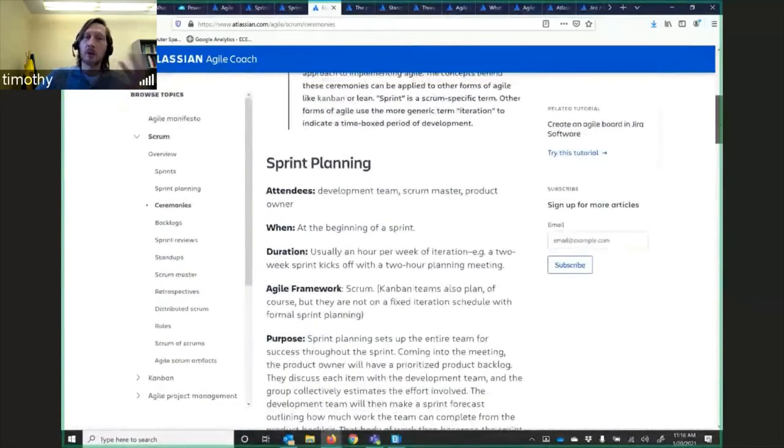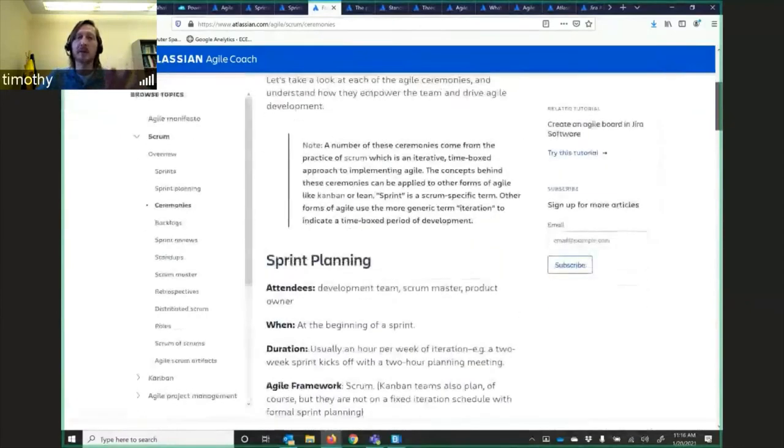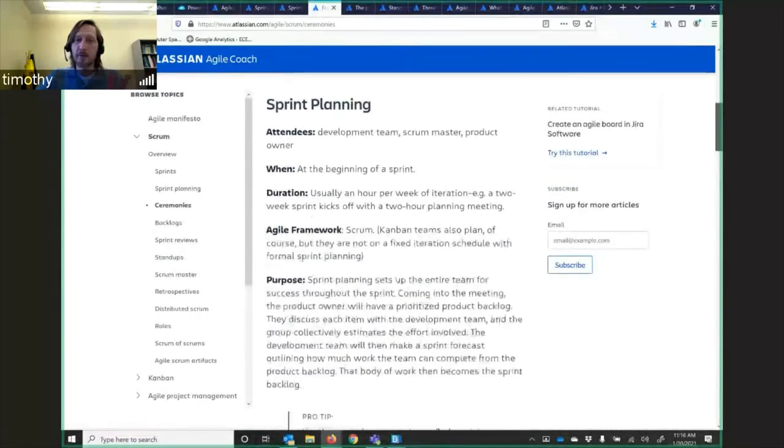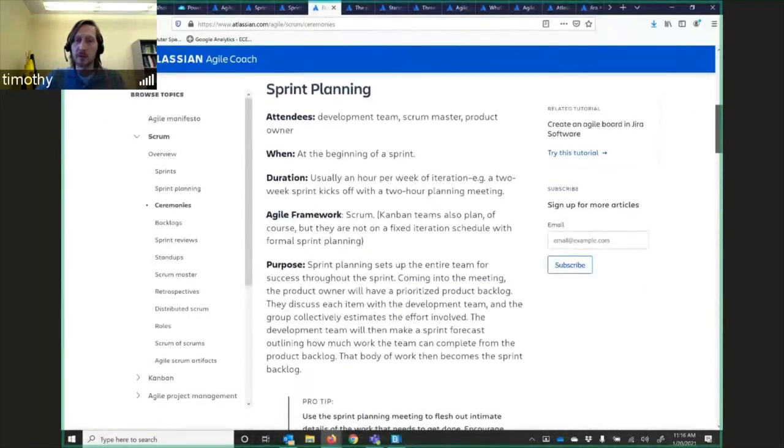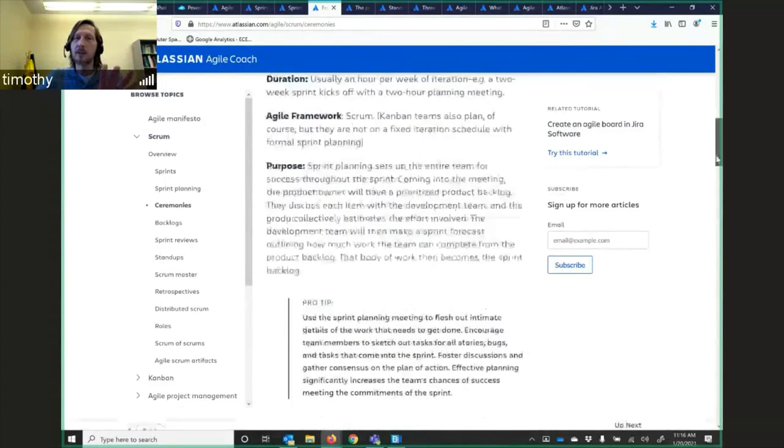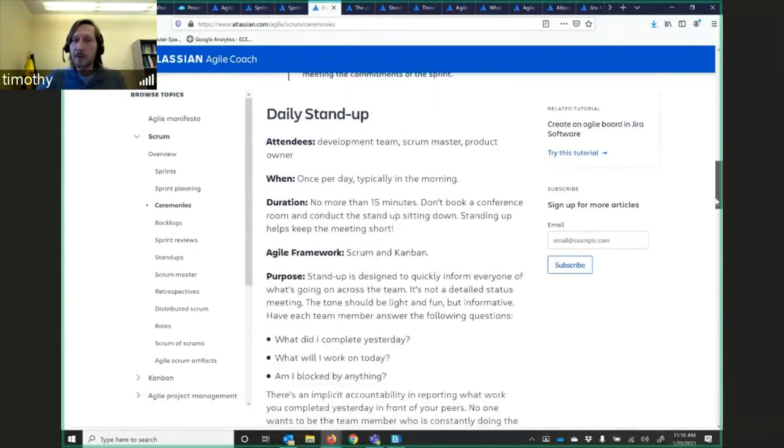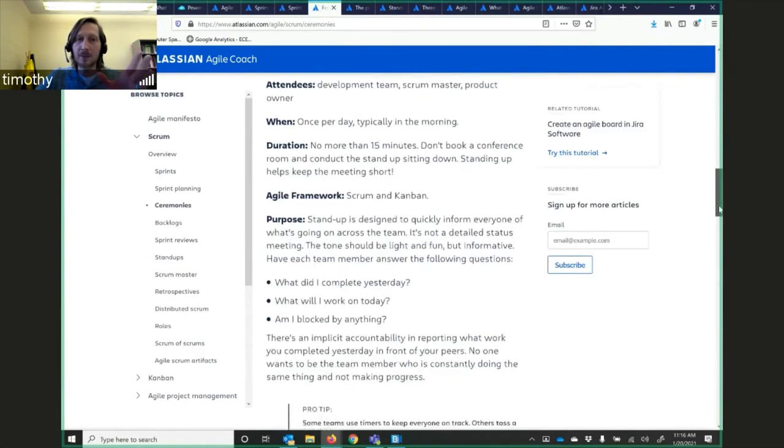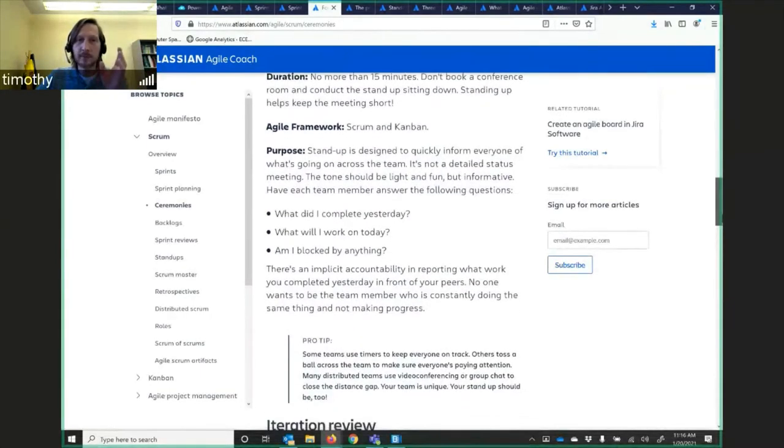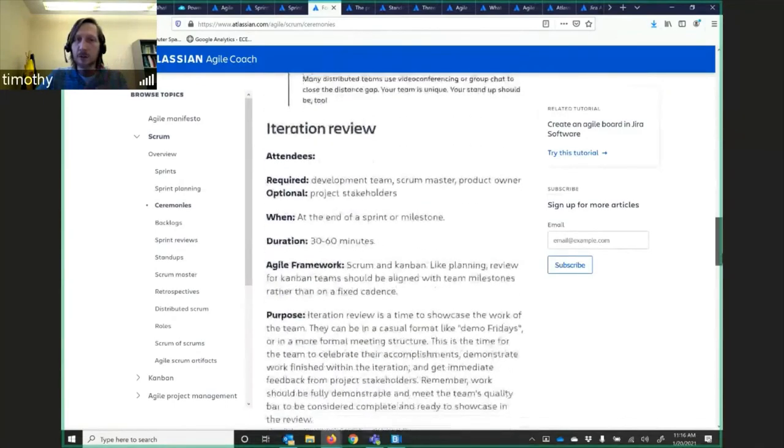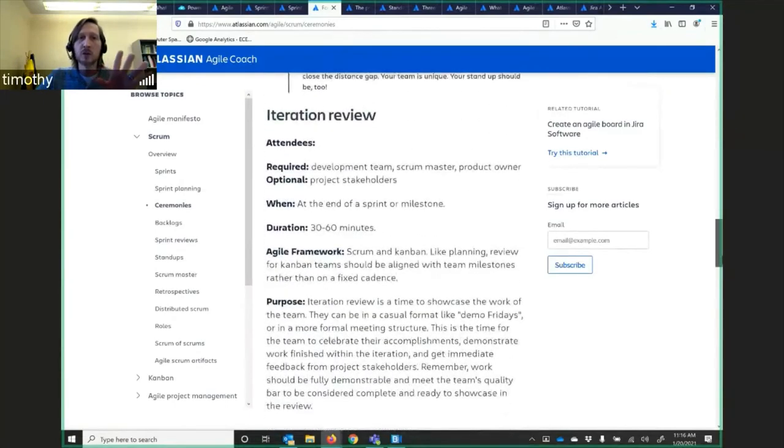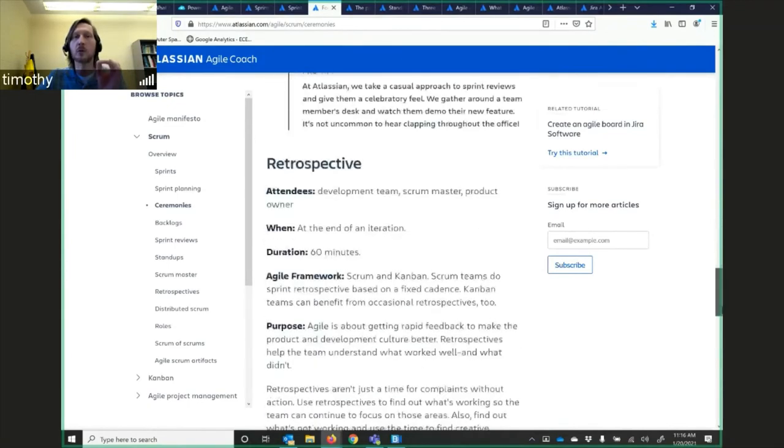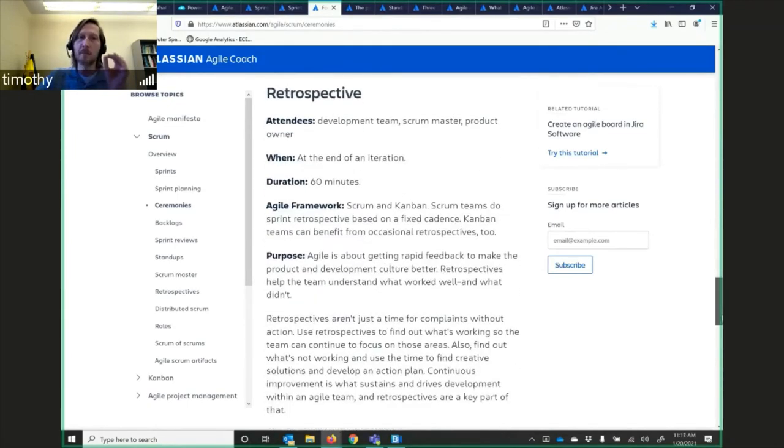Here are some of the ceremonies or meetings that they go through. Sprint planning, and it says who needs to be there. Then you're going to have daily stand-up meetings, no more than 15 minutes. Don't book a conference room. Conduct it standing up. Standing up keeps the meeting short. And then iteration review. Duration, 30 to 60 minutes. Again, it's going to be short. You're going to be effective in your time management.